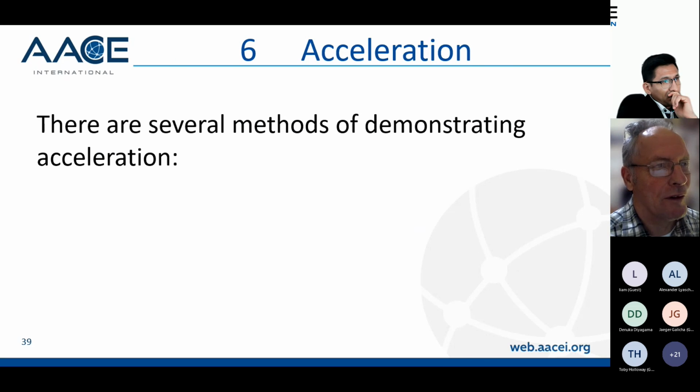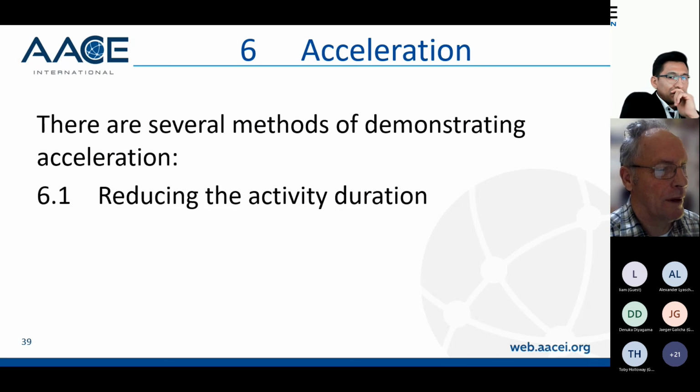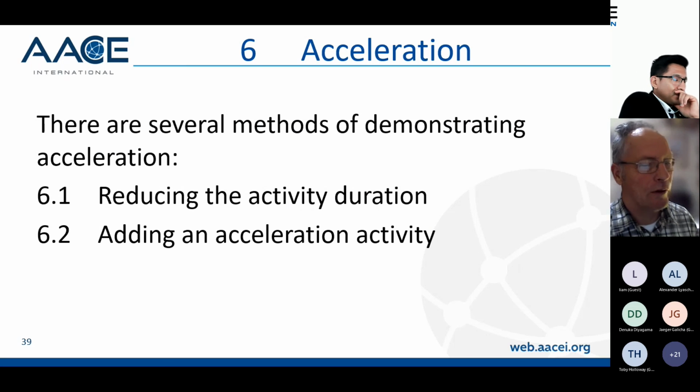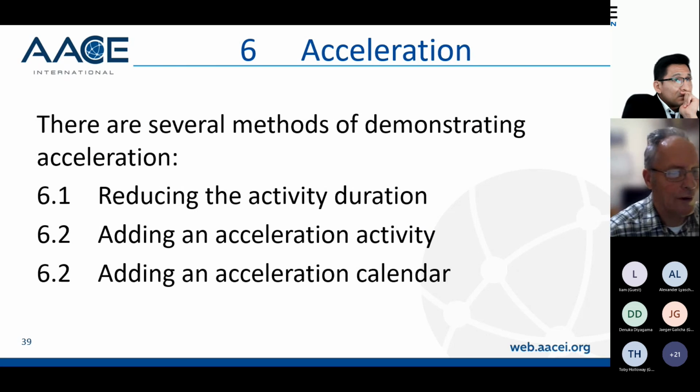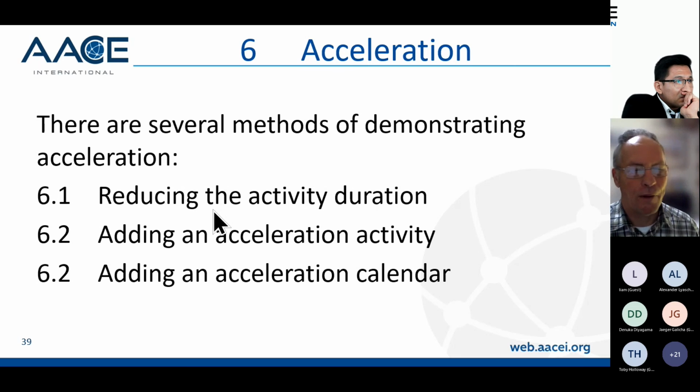Acceleration, there's several methods of demonstrating acceleration. This is the next topic. You can reduce the duration of activity, you can add an acceleration activity, or you can add an acceleration calendar. There's a number of different methods.